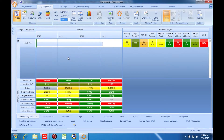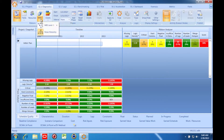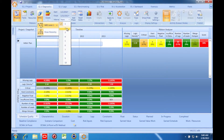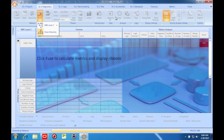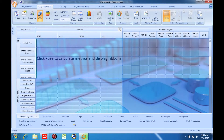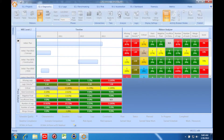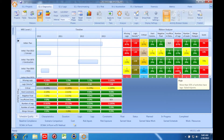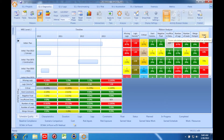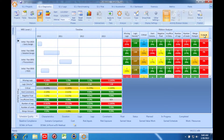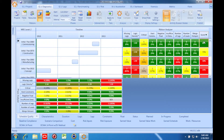What if I want to dive a little bit deeper into my schedule? Option one is to drill down within the WBS. I can use this button here to select the WBS level that I want to view. Here's level two for my schedule. Now I can see my quality scores for each of the level two items in the schedule, which really helps me understand which areas have been planned with higher quality than others.